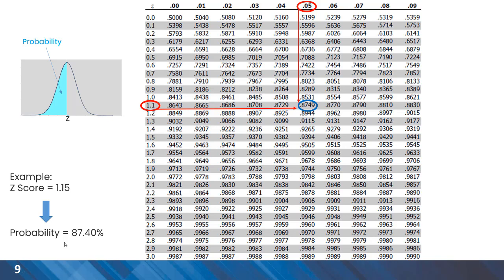As you can see, the tables look like this. We can find the value for a z-score using the link between rows and columns of the table. As an example, the z-score is 1.15 and the probability associated with that can be read from the table — it is 87.4%.